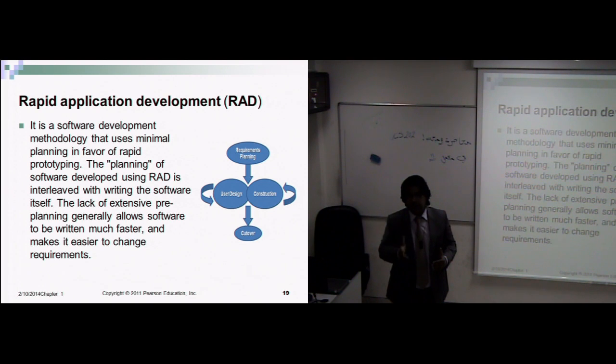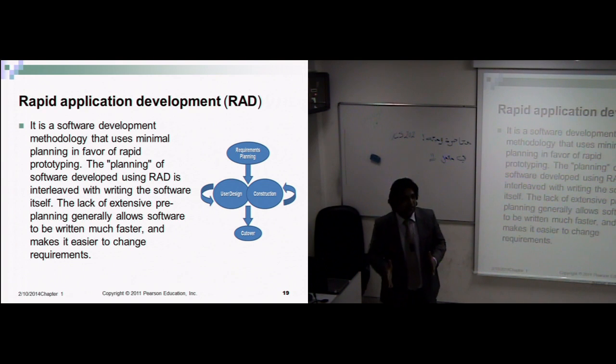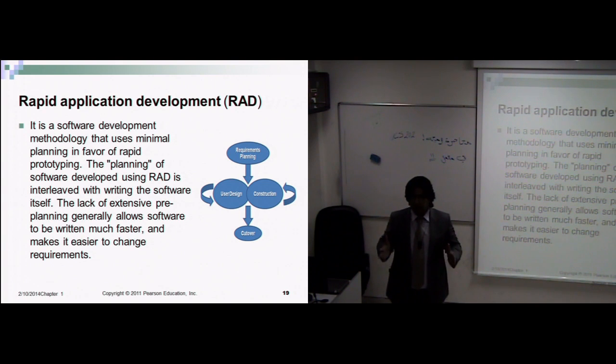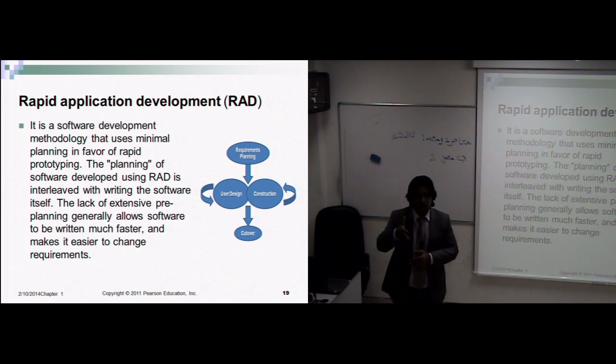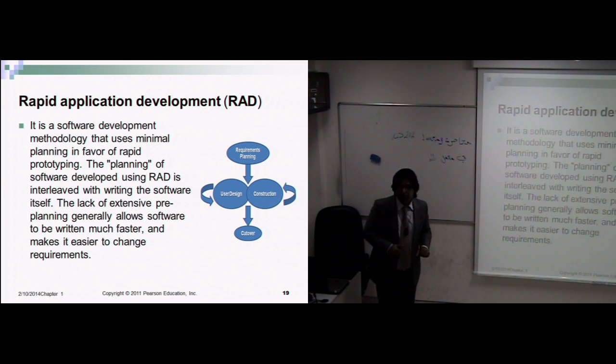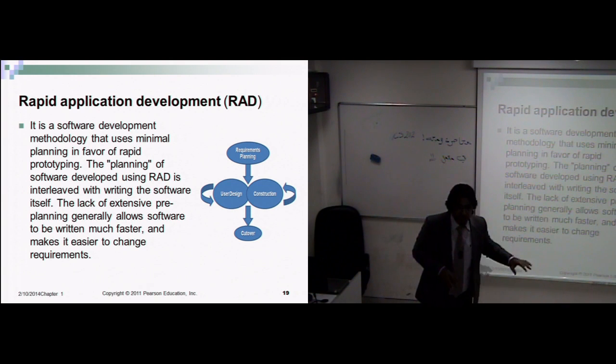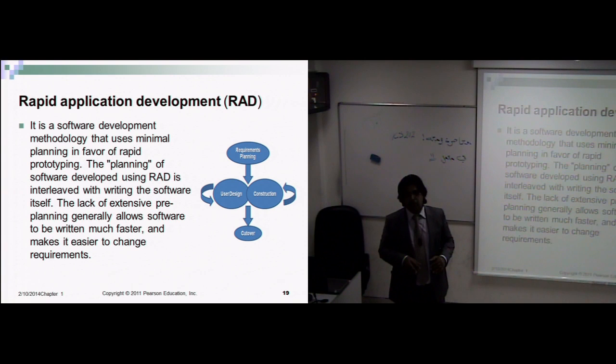It's unlike the waterfall method where we first spend a certain amount of time, a month or a couple of months, on planning, then on analysis, and then on design, and then at the end we start implementing, start coding. It's unlike that. Right from the beginning, they start writing their code, and this writing of code is interleaved with the initial planning. Do you get my point or not? If you have any questions, please do not hesitate to ask, because this is one methodology, and after that we will jump on to project management.